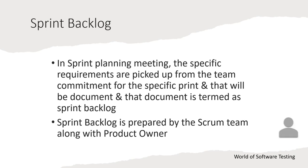The second artifact is the sprint backlog. Once the product backlog document is prepared, the sprint planning meeting happens and the scrum team is part of this meeting. In the sprint planning meeting, specific requirements are picked by the team as their commitment for the upcoming sprint.